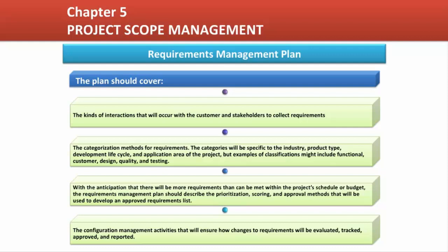The main purposes of the Requirements Management Plan are to help to ensure that nothing is missed while requirements are collected, and that requirements and subsequent changes are properly linked to deliverables and scope. For example, if one of the customer requirements is that the final product be biodegradable, then that need will be linked to any component deliverables that go into the product's final makeup.